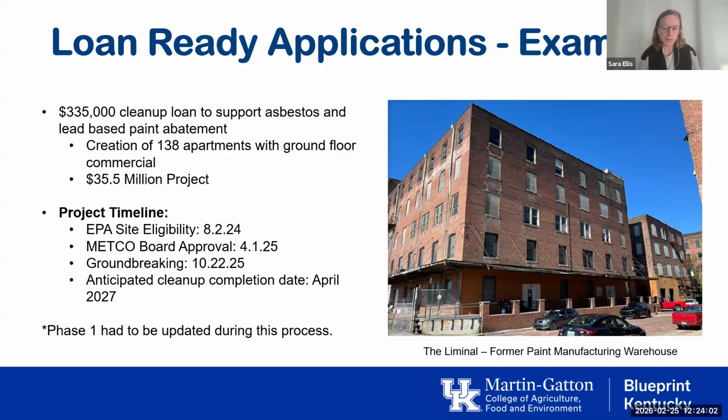They did have to update their phase 1 during that process because if you remember, Kiersten mentioned that 180-day timeline. They passed that, so they did update, and they did their groundbreaking in October. So the cleanup is currently in progress. Everything's tracking on time, and they're thinking that they'll be done in April 2027, and that is just cleanup. After that, they're going to have some additional work from cleanup to getting the building ready, to getting tenants moved in and actually generating revenue.